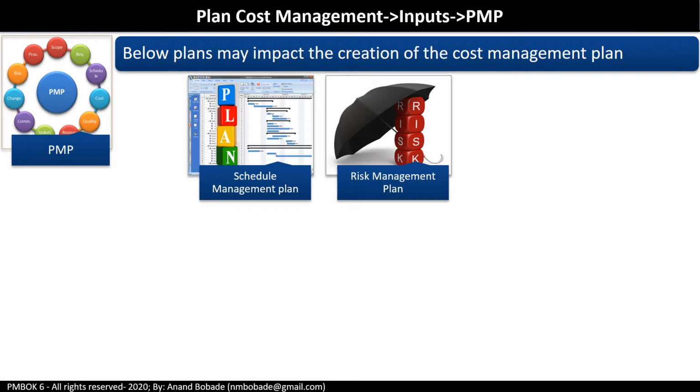Risk management plan may impact cost estimation and management again. For example, planned risk response may cause additional costs to the project which are justified by reducing the risk of the project.